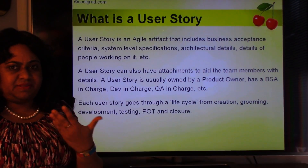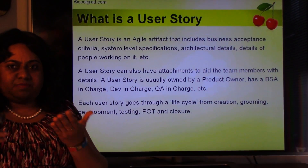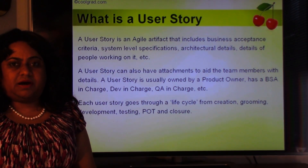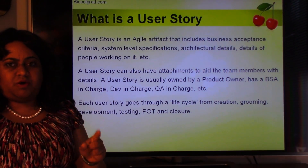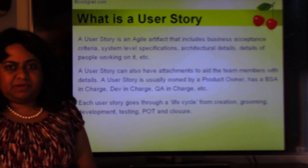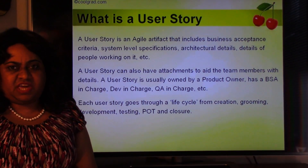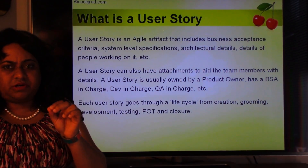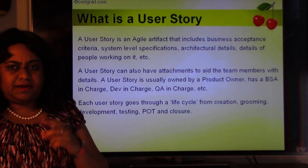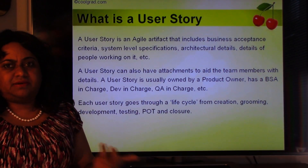The product owners write their business requirements and acceptance criteria, and the business analysts translate these into system-level specifications. For example, if designing a website like Facebook, the business team may specify what logo, login, and colors they want on the homepage. But a business systems analyst or BSA translates these into system-level specifications for developers — specifying things like the exact color code, font, text box placement, maximum 50-character username fields, button placement, and page navigation. All these system-level specifications are written by the business systems analyst.